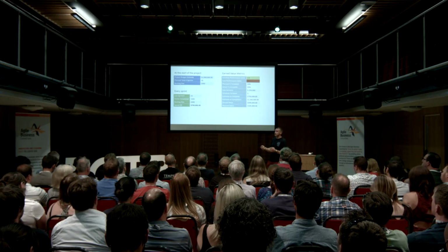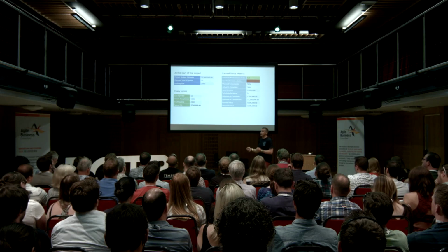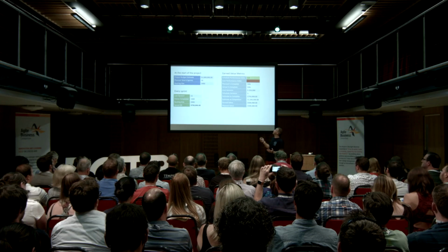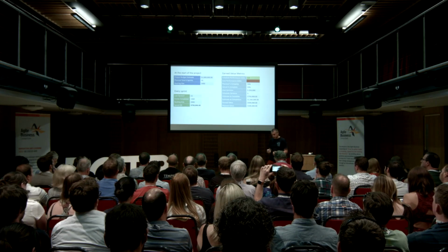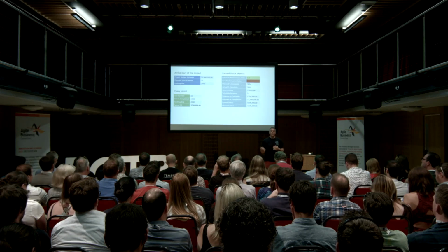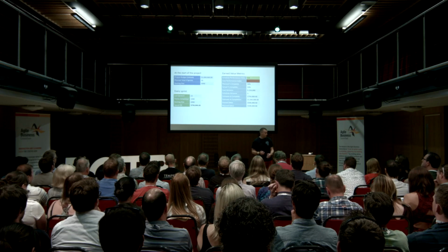If we had overspent, so in this example we completed 1,000 points, so that's half the work done. So our SPI is 1, but we spent $750,000. We're now massively over budget, so we're on track for delivery, but we're spending too much money.